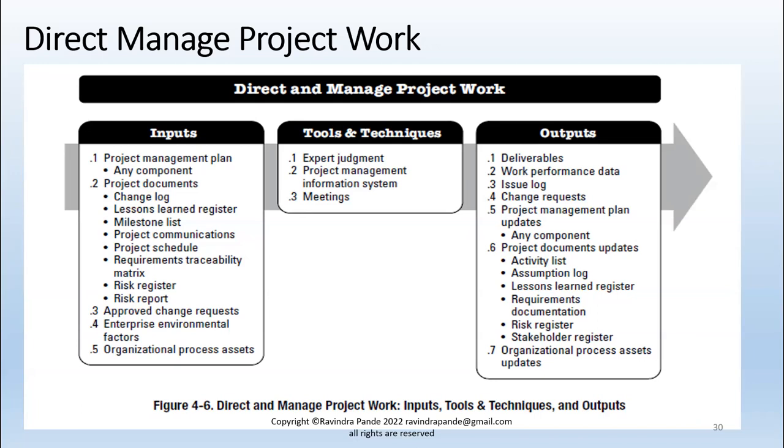I channel the changes to the change management process. Here, I have a body called the Change Control Board, CCB. If any client executive, even including the product owner, asks me to add something to the project, I request them to channel it to the Change Control Board.